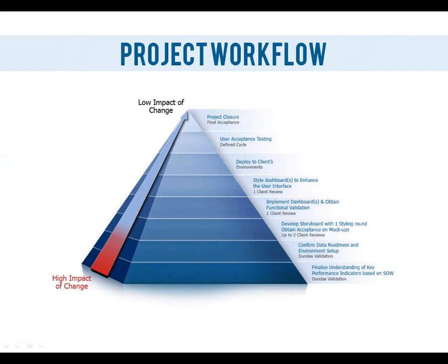So what we have done, obviously, is just like any good IT software company, we've got a certain workflow that we work with. The key to this is, obviously, there's nothing really spectacular about this, but there are a couple of key points here. One is locking down the key performance indicators at the very beginning. So, any further changes to the key performance indicators would make us re-examine the scope and the deadlines that we committed to internally here. And that's very key to making sure that you have a sense of accountability as you deliver the project.